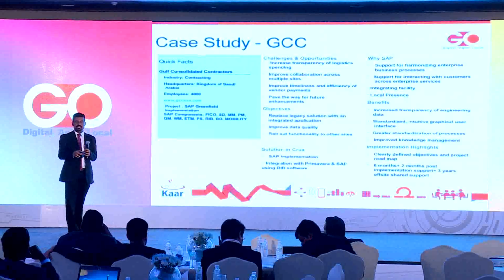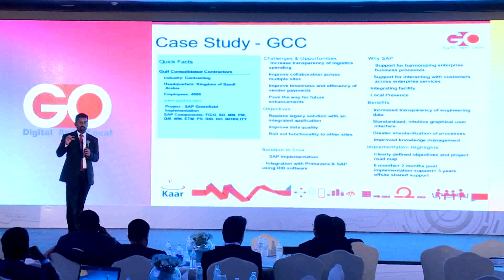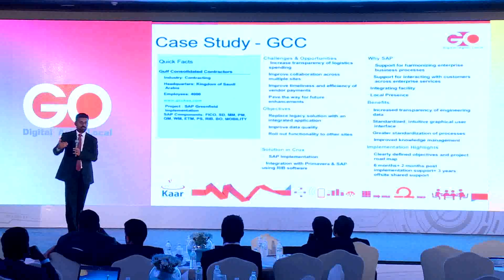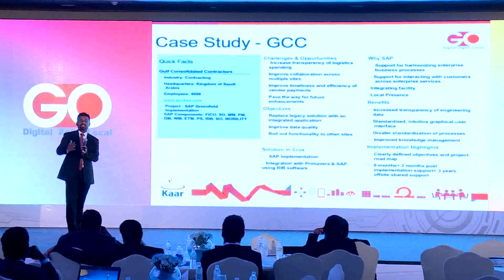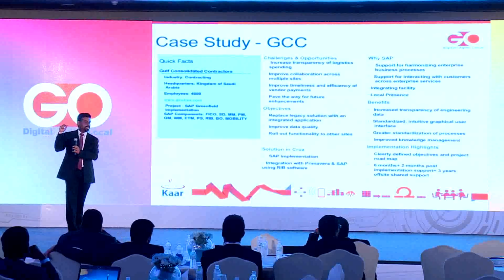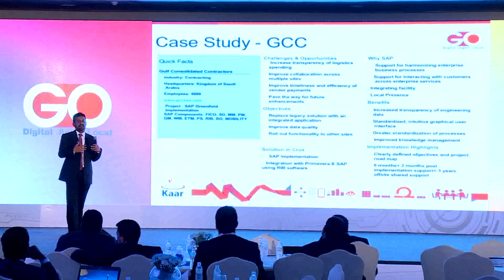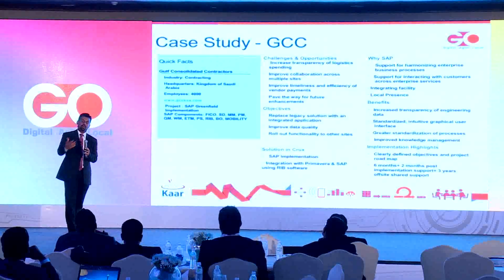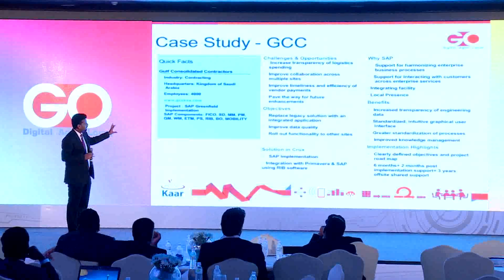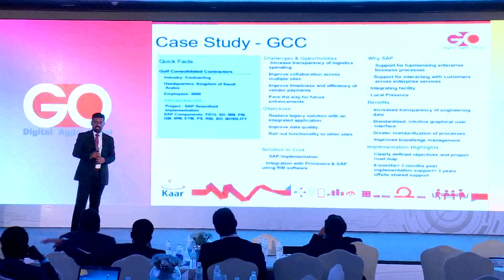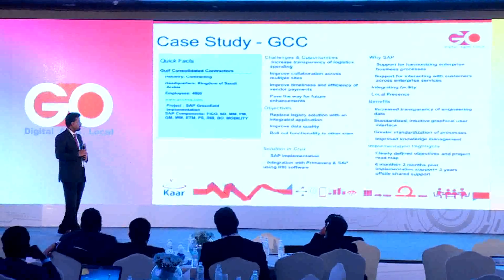And it does the estimation. The baseline is created. The planned cost is created for each and every activity, and then it is pushed into SAP. Now SAP has the planned cost, schedule, everything, and it starts capturing the actuals as the project goes on. So this information, again, can be pulled to develop reports and dashboards, to analyze and see how the project could be executed better and faster. So this is a case study where RIB played a small role, but RIB has much more potential, as I told you, which we can understand further.